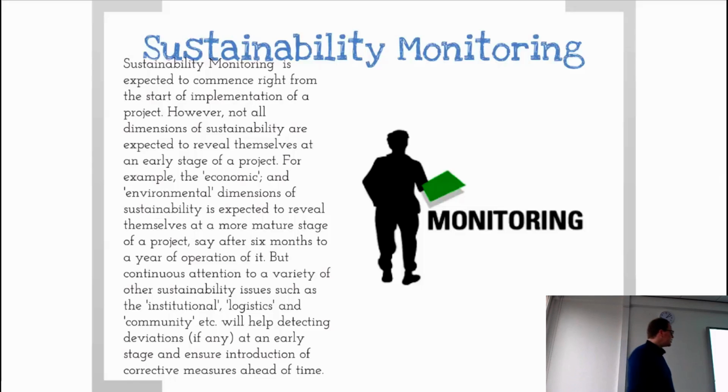So in a nutshell, monitoring of sustainability is a different game to monitoring quality performance, for example, against our criteria, because the effects of sustainability are often not visible during the production time. Yeah? So we are often having here post project life cycle indicators, which makes sustainability a tricky thing to actually monitor. Yeah, but we can already prepare for indicators. Does that make sense? Yeah.